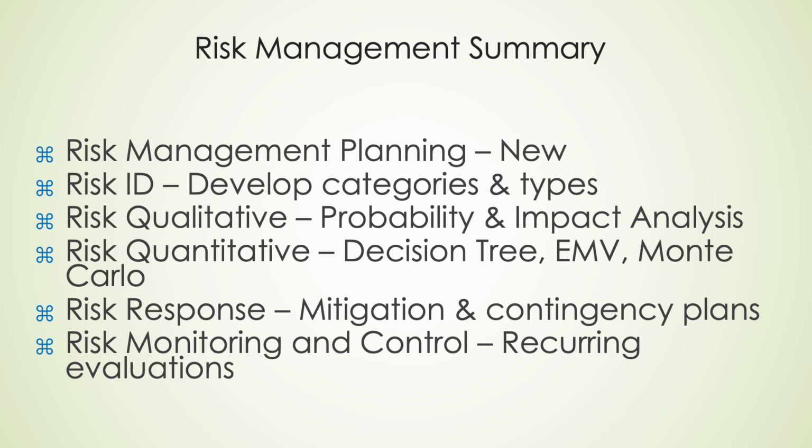Risk management is a structured, cyclical process that begins with planning to define strategy and methodology, followed by identification to categorize and capture potential threats and opportunities. It then advances to qualitative analysis, where risks are prioritized based on their probability and impact, and quantitative analysis, which uses tools like decision trees, expected monetary value, and Monte Carlo simulations to numerically assess their effects on project objectives.